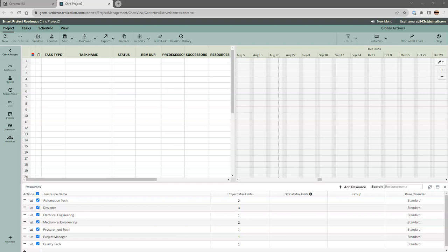For a project that takes a month or 2 to complete, you really don't need probably much more than that at the Tier 1 or the larger block level. Larger projects that span 6 months, 12 months, or multiple years may require those phases to be broken up into buckets that we can get our arms around and deploy resource capacity in a way that's focused.